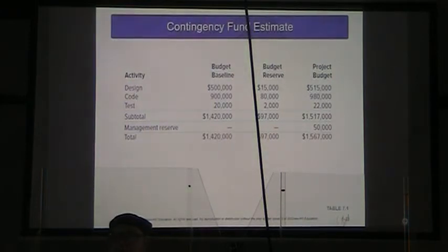We add the budget baseline and the budget reserve together. We have a management reserve that comes in at that point, so that it all adds up to $1,567,000.